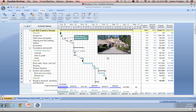FastTrack really can be as complicated or as simple as you need. If you want to use a task list that just goes straight down, you can do that. You can also continue to indent and create different phases, tasks, and subtasks in your project. I believe you can actually indent up to 64 times, so you can take the most complex schedule or the simplest schedule and put it into FastTrack.